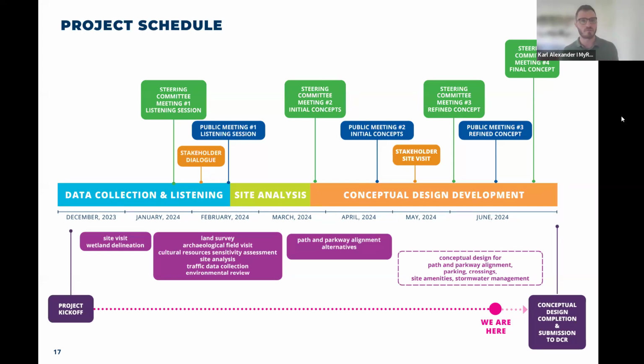The project was very front-loaded with field work and assessments, the land surveying, environmental analysis, traffic studies, and initial visioning and listening sessions with members of the public. That informed our development of initial concepts that we presented in early April, and worked through to then develop our refined concept in late May, and presenting now here this evening.